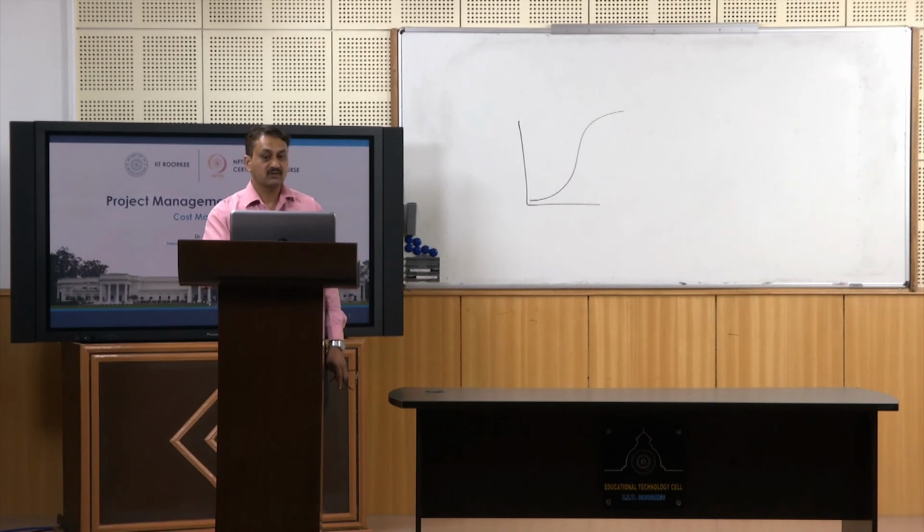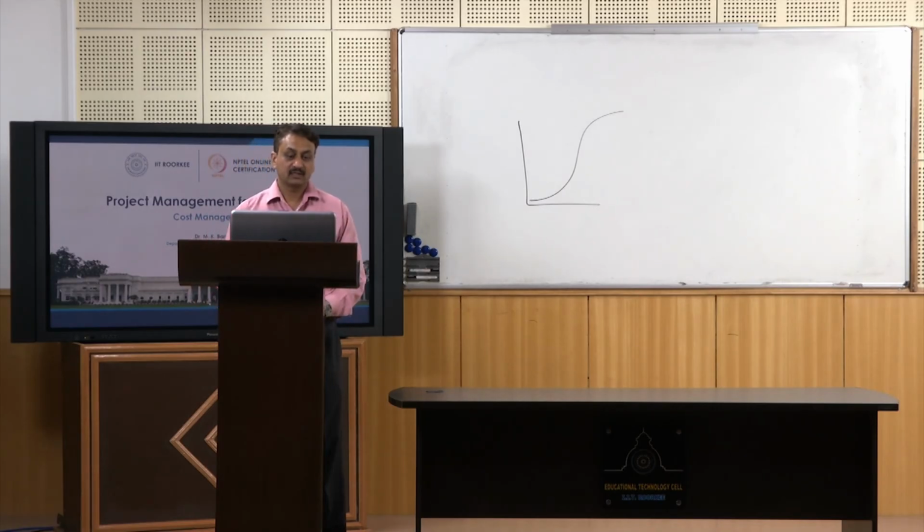Is it good? No, it is not good, right. It should not be less than 1, right. It means since your SPI is 0.43, you are behind the schedule. So, you can also find out how much time it will take to complete the project now, though it is known to you that you are behind schedule. So, you can easily calculate that we are running 10 months behind schedule. How to get this value? It is 1 upon schedule performance index multiplied by 8, right.